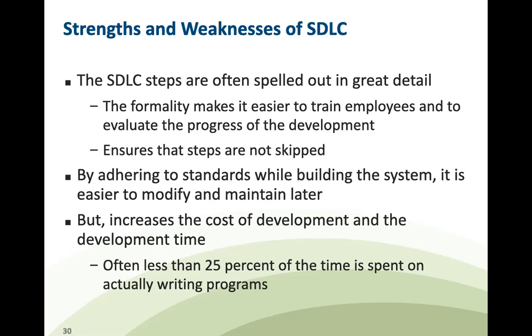But it increases the cost of development and the development time. One disadvantage is that it increases the cost of development because there are a lot of stages, right? And the development time also is increased. Often less than 25% of the time is spent on actually writing programs. So if you consider this whole software development life cycle, even less than 25% of the time is spent on writing programs. So like 75% of the time is, you can't say wasted, it is utilized for other tasks, but those are essential. So that can be considered a disadvantage anyway.